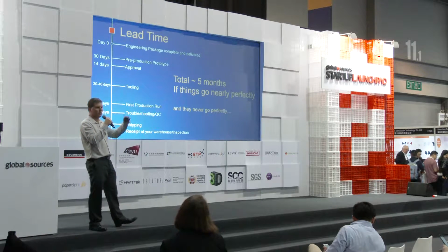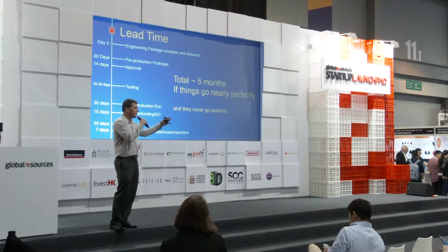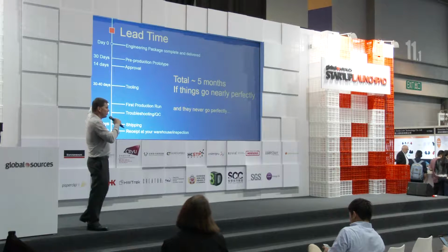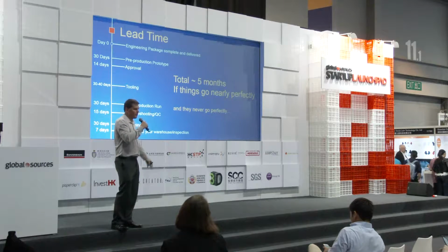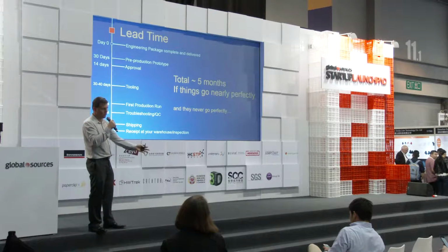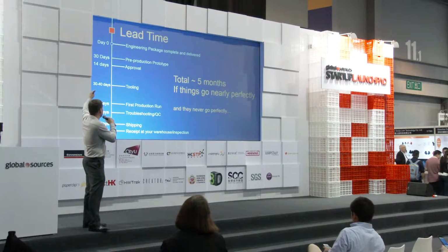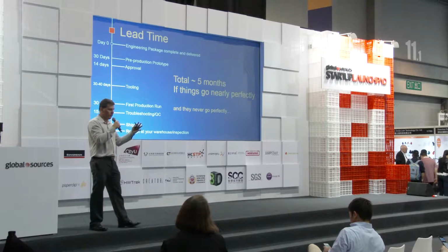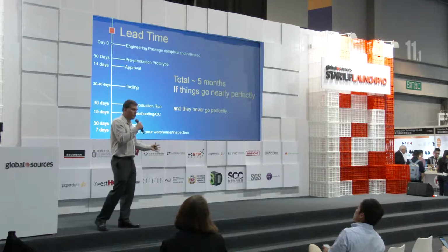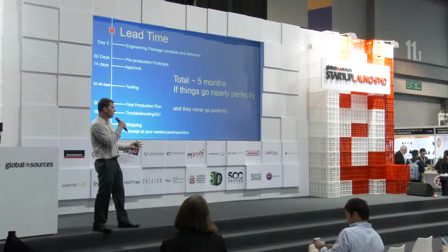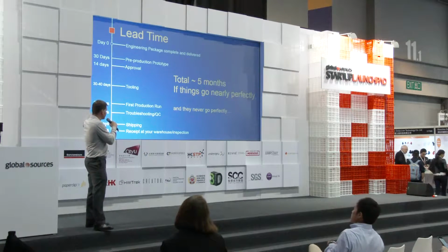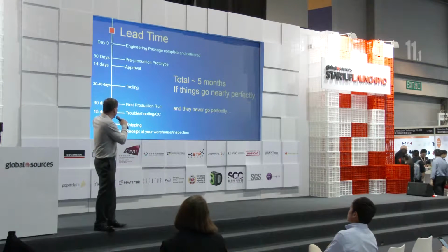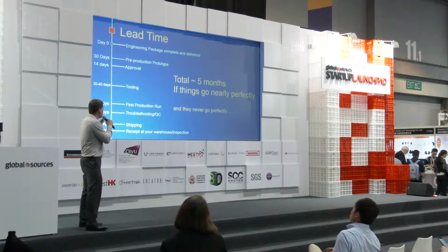Most of our clients are in the US, so we're shipping this and they're testing it. So maybe about 14 days for approval. Tooling between 30 and 40 days from when the partner receives the funds. So there's some more time there and some modification in that. If you don't have any long lead time components, and if you've got all the components ready by the time the tools are complete, first production is maybe 30 days if things go nearly perfectly. Definitely can be a lot longer than that.